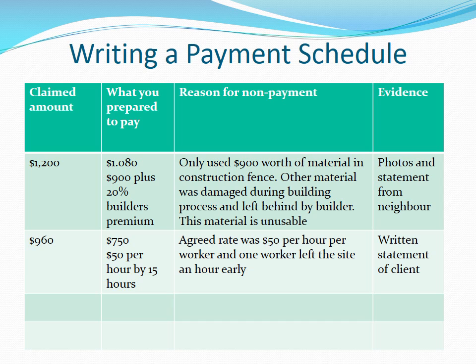The same is true if you are claiming amounts payable to you under the contract, such as when a builder has not completed in time and the contract required the builder to pay a daily amount to the client. Again, in such instances, you would list them separately in your payment schedule because you are not claiming you do not have to pay. You are saying you are paying the payment claim amount by way of set-off. In each case, explain what you are claiming and how you have calculated it and the evidence you rely upon.